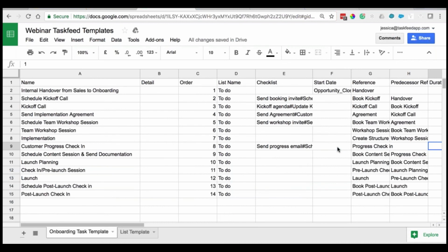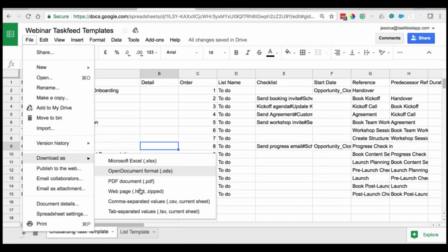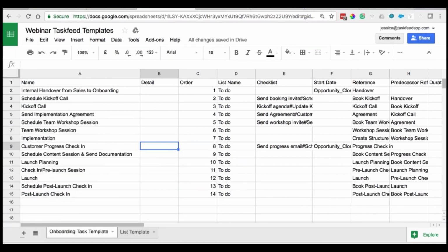I just have the duration, but now I need to add a start date for it because it no longer has a dependency to anybody else over here on the board. So it's not going to be scheduled unless you give it a date. So I'm going to give it a reference to this first date plus 15. Okay, and this is just a random date that I just created, and I'll show you how it's going to look.